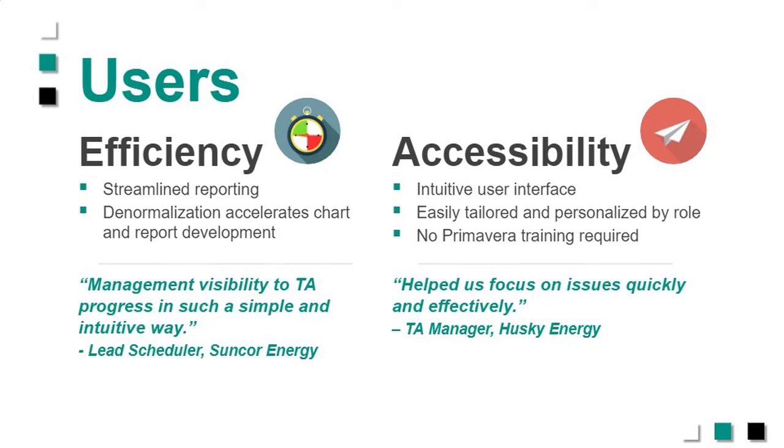And if you've ever worked on a turnaround project, you know you don't have a lot of wiggle room. You're trying to coordinate thousands of workers in a small space, and you need to get them where they need to be on time. And an hour can be thousands and thousands of dollars of lost productivity. So it's important to hit those timelines very well.